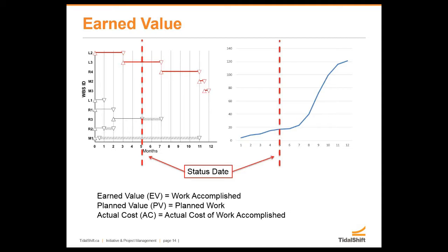So that we can put that value into the software and actually have some valuable metrics, because garbage in, garbage out, and we need to make sure that we're talking the same currency. And hence that's one of the values of earned value, is that it actually brings everything back to dollars, so that when I'm doing my calculations, you're comparing apples to apples.